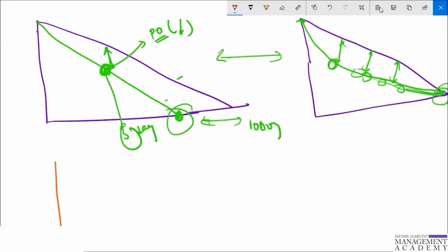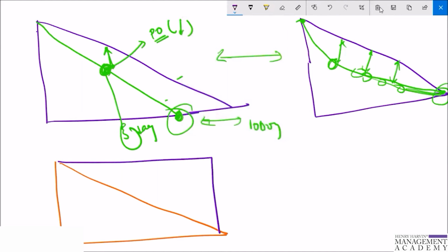So this is another chart, this is the actual scenario, and this is the real one, and this is the ideal one. What does it mean? That the team is not burning anything here, and there are multiple possibilities here. One is that the team is probably doing some work, but maybe it does not update the progress accordingly. Another reason might be that the product owner has added the same amount of work that has already been completed, and therefore the line is straight. So there are multiple ways.